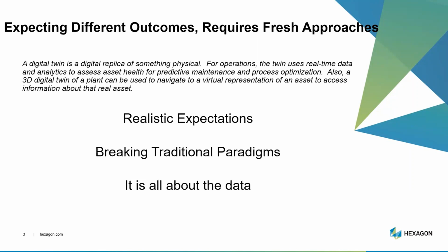If you know the typical timeline around that, that usually means we start to build out proofs of concept and then start to execute on understanding the exact data needs that we would have, generally in the detailed design and execution phase of a project. We don't really start to build out our twin until we start to move away from bulk-based construction into systems-based turnover and completion, as you start to build as-built data.